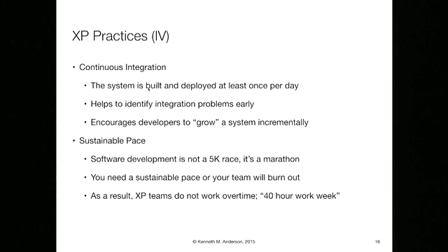But another practice is sustainable pace. So we don't want these death marches that you hear about where the deadline is looming. Everyone has to stay and work 80-hour weeks until we meet this deadline. Instead, they go, that's ridiculous. By the end, you're zombies. You're inserting more bugs than you're fixing because everyone's tired, not thinking correctly.